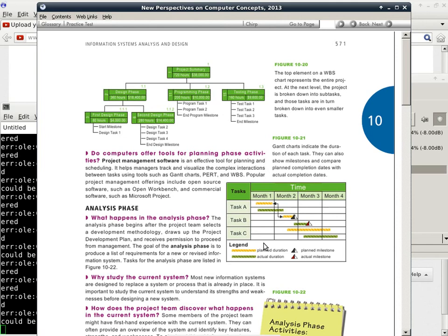Instead of saying, oh, I spent 20 hours on this part of the project, I should be this way through the project, because time is not a good measurement of completion. You need deliverables, like, okay, can the information system get this part done? Okay, importing data from the old system. Yes, it is done. It's a milestone. Okay.